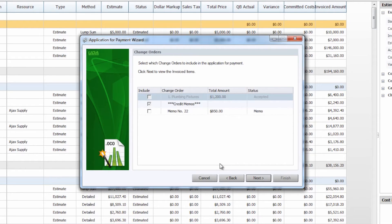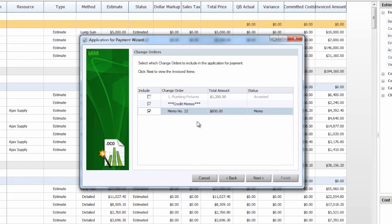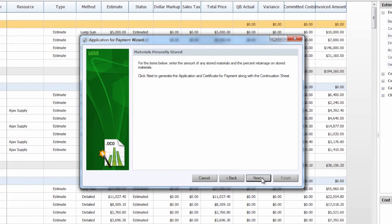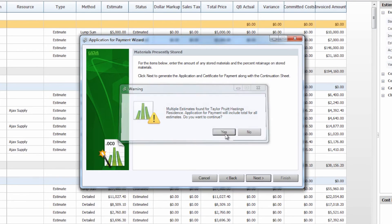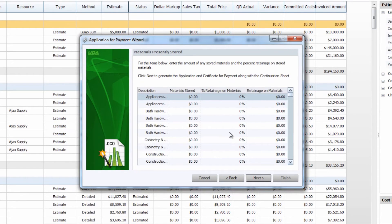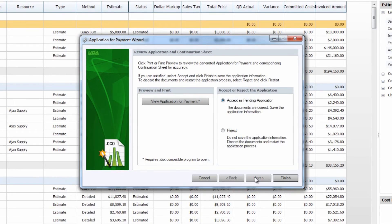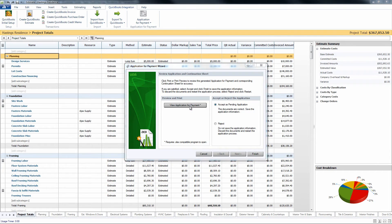On the next screen, same thing with the change order we included on the last application — it is still present so you can see the amount included on previous applications but you cannot include it again. In this case we'll go down to the credit memo and select to include this $850 credit. Once again we do have multiple estimates and we would like to continue. We don't have any materials stored or retainage on those materials, so once we step through we can view this second application for payment.